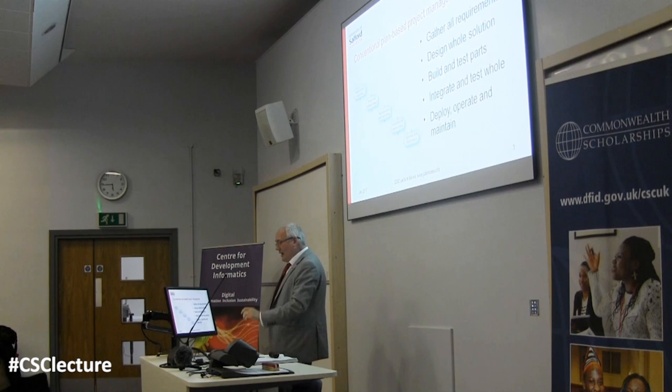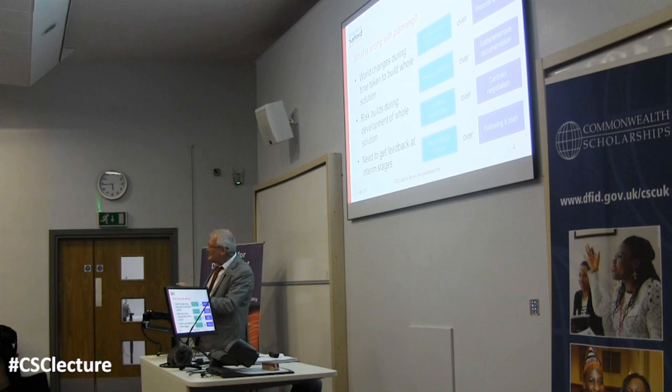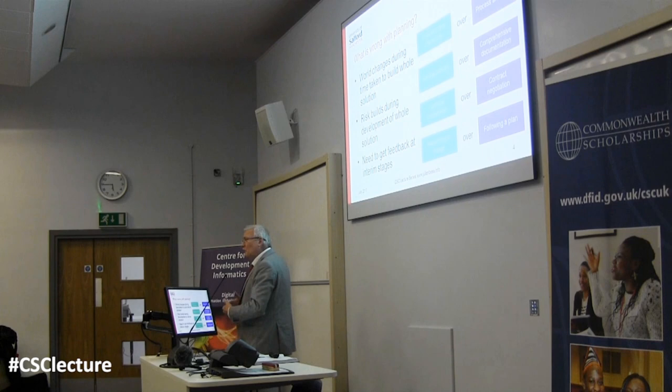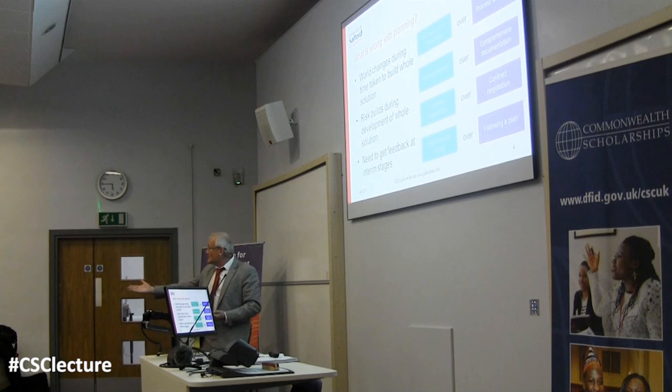And so what people have started to say is, well, what's wrong with planning? Why is this not working? The fundamental problem is that the world is moving on. While you're going through all these carefully organized steps, spending ages gathering all the requirements and writing everything down, the world is changing around you. Once you've written everything down and the world changes, you're out of step with reality. The design reality gap that Richard talked about is happening before your very eyes.